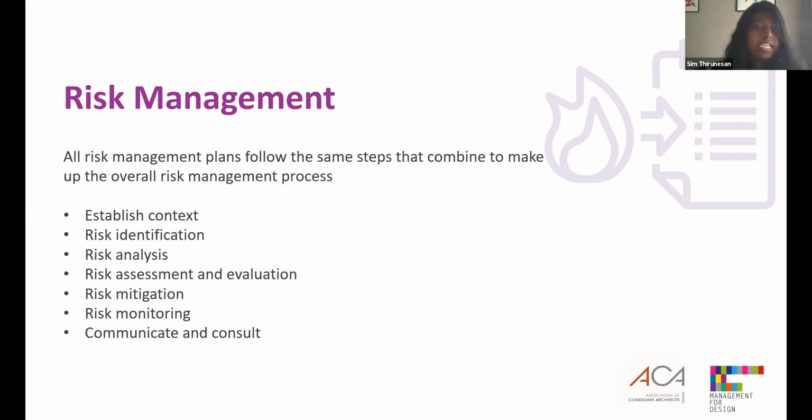During the risk mitigation step, practices need to assess the highest ranked risks and develop a plan to alleviate them using specific controls. These plans include risk mitigation processes, risk prevention tactics, and contingency plans in the event that risks come into fruition. Risk monitoring. Part of the mitigation plan includes following up on both risks and the overall plan to continuously monitor and track new and existing risks. The overall risk management process should also be reviewed and updated accordingly.